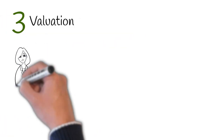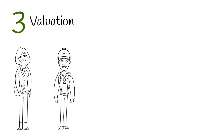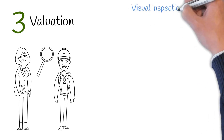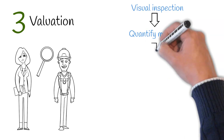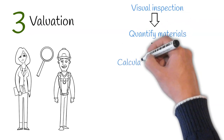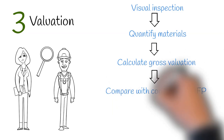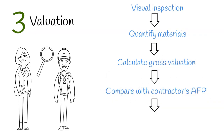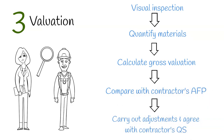Stage 3: Valuation. This is where the employer's quantity surveyor will need to meet with the contractor's quantity surveyor on site and inspect the works that have been carried out. They would need to assess the work carried out for revision inspection and quantify the materials on or off site. From here, they would calculate the sums required for the gross valuation and see how this ties up with the contractor's application for payment. They would then carry out adjustments and provide reasons for the adjustments. The valuation is then agreed with the contractor's quantity surveyor.